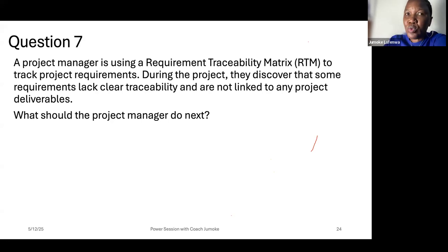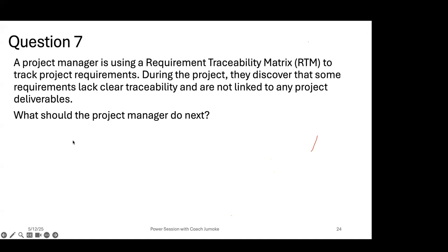So you'll be able to trace, and the chief has said 3 bedrooms. So if somebody said bathroom in each room, you can still trace it to each of the rooms. If somebody says hall, you can trace it for the 3 rooms. So any requirement that you can't trace to any deliverable, you reject it. And the requirement traceability matrix would help you to be able to link the requirement to deliverables, to source of origin.